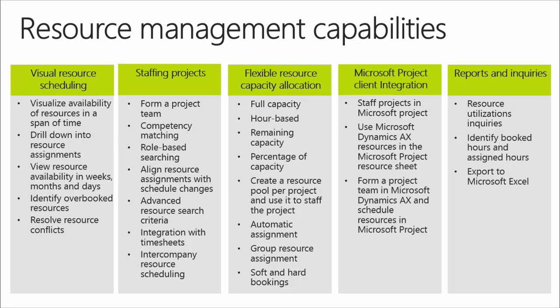on a very flexible basis. We also provide out-of-the-box integration with Microsoft Project Client, where you can use it in 2 different scenarios. The first is you open up Microsoft Project, plan your projects, and use AX workers to staff your project. The second one is using Microsoft Project to form the project team using resource availability, and then continue the resource scheduling on tasks in Microsoft Project.